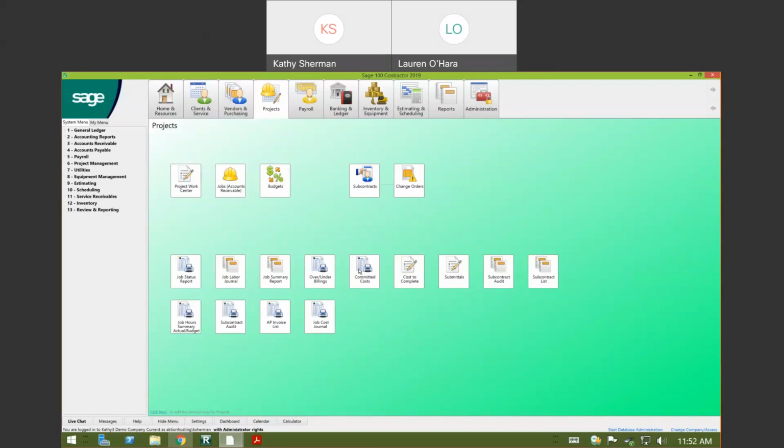If it's paid, it's fully burdened, so it's how your payroll was set up. If it is more prior to being paid, so your accrued payroll column, if you saw when I ran that report, I entered a burden rate. I put in 30%.